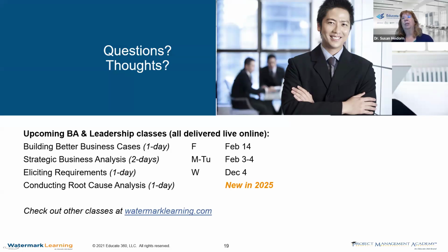But risk should be constantly monitored anyway. And so by the time I put the risk in for the business case, they could have changed with the project charter. They could change during the project, at any point in time. So you just kind of have to keep an eye on those. I start with the same and then just analyze them when I'm doing the project charter and saying, okay, this risk isn't anymore, or that I've got to really manage that risk, whether it's mitigate or transfer, whatever else I need to do with that risk. So I'll have to manage it during the project. It's risky business out here, y'all.